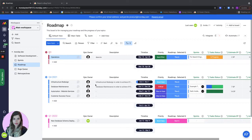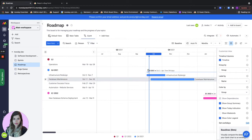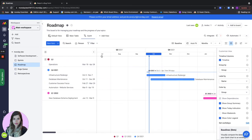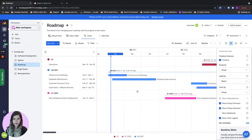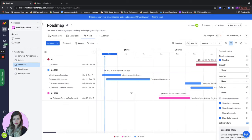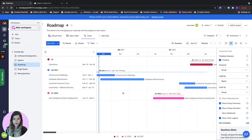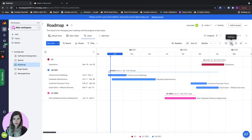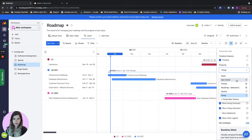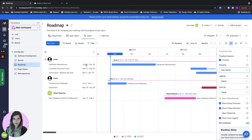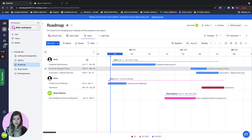What if I want to see my product roadmap on a Gantt? I'll go to the Gantt view up here and here we have a view by the different quarters, but what if I want to see it also by my epic owners. I will click here on the settings and simply group by the epic owner. Very easily I can customize my Gantt to see it exactly as I want it to be.